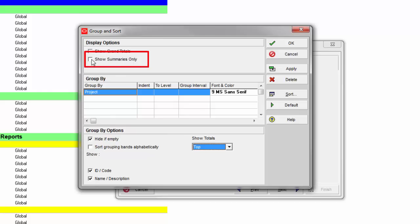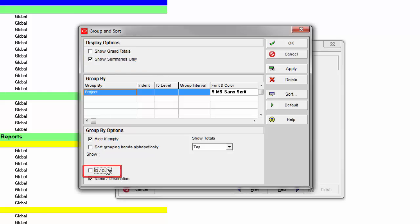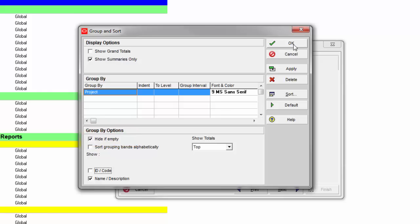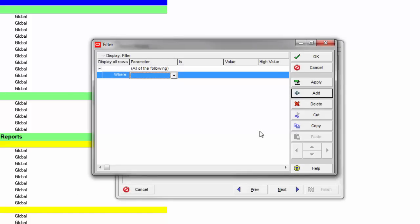For the filter, in a turnaround project I typically don't want pre-phase or post-phase data in the S-curve — just the execution window, including shutdown and startup phases. In this case I'll run the entire S-curve for the full project to keep it simple. In the data options window, I turn off 'show period total' since that's not useful, and turn on 'show time intervals.' I go to the timescale button and set the timescale start to project start. If I had filtered out phases, I might hardcode a specific date for the start.